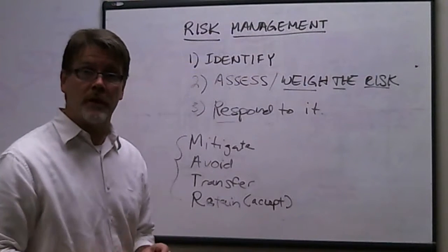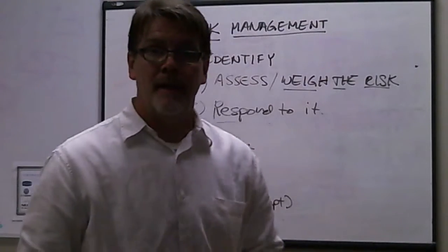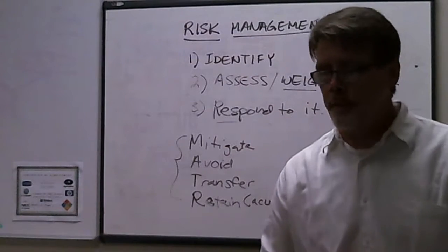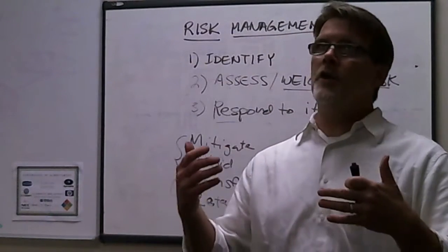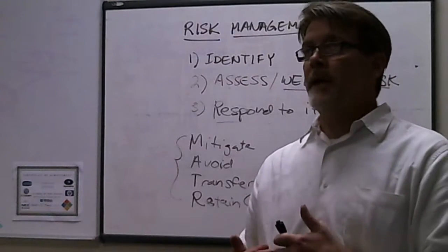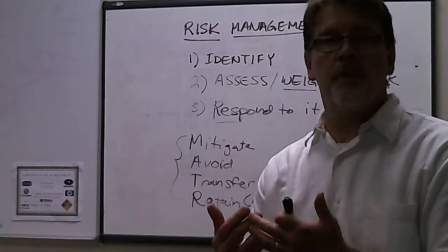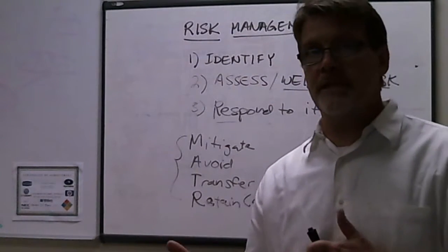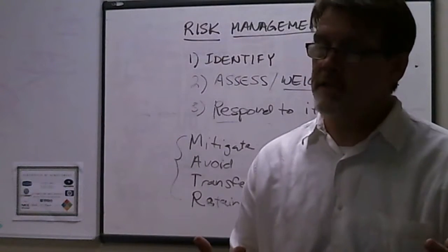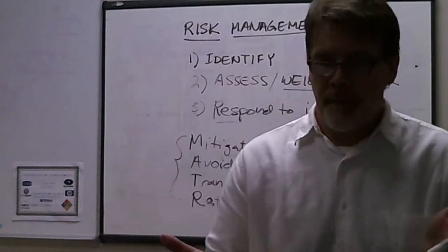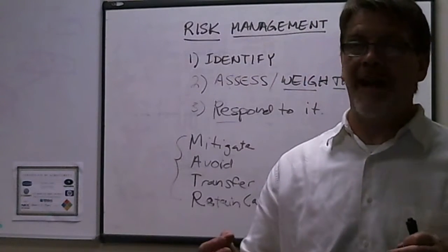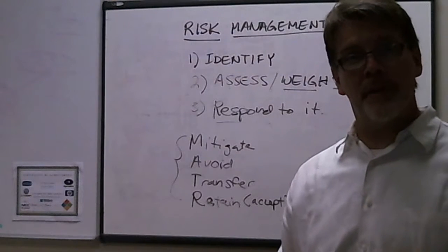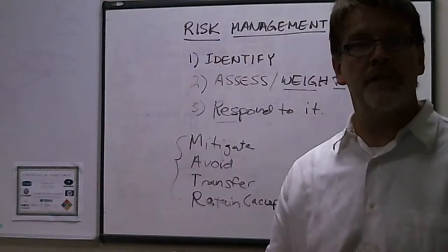And so let's review real quick what it is that we want to do, because risk management is really what project management is all about. As you go through putting together the work breakdown structure, the project network, looking at all of the work and how it interrelates, how you have successors and predecessors, and how group interactions are dominant within the project, and the risk involved with that, you go back and look at your work breakdown structure again and see where risk might play a role in the successful completion of that project.